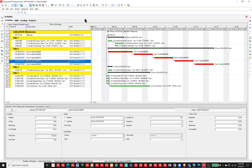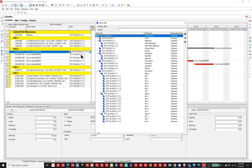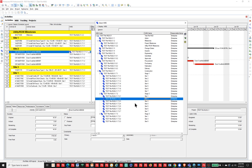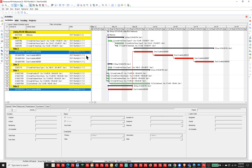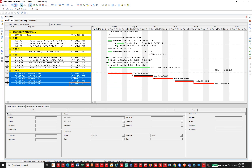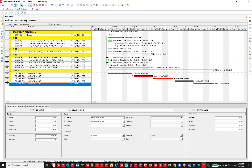I can even quickly change — just as an example — if I've got these activities in a particular WBS and I look at it and realize that's not the right one, I can fix that as well. Putting the WBS in a column, I can just double-click. If that particular one wasn't correct and it was supposed to be Stage Two instead of Site Two, I can go down and change that. I can select the ones that changed and even without auto-reorganize off, I've got them in the right group now. So just a few examples of some very easy editing in P6.